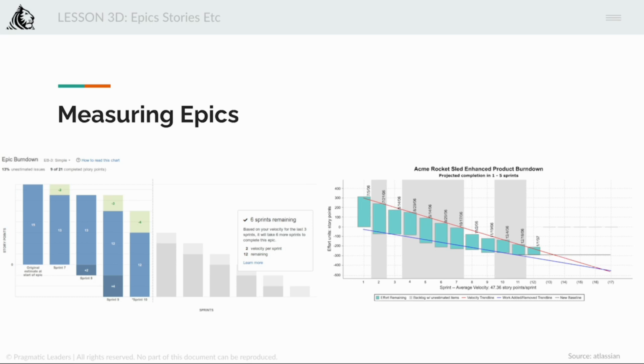These are burn down charts. They track the progress of development over a larger body of work than the sprint burn down. I'll explain the sprint burn down in the next sheet. And guide development for both Scrum and Kanban teams, right? Since a sprint for Scrum teams may contain work from several epics and versions, correct? So in a single sprint, you might have tasks from multiple epics, correct?